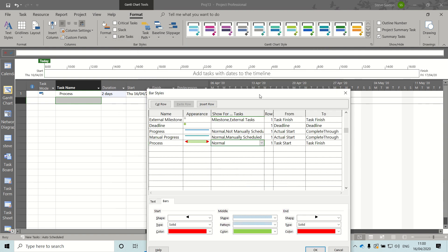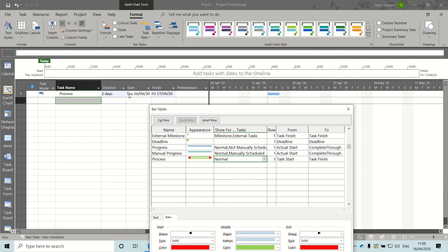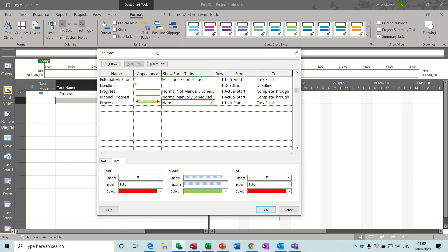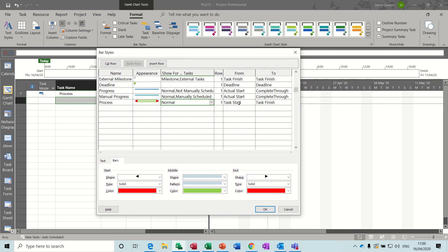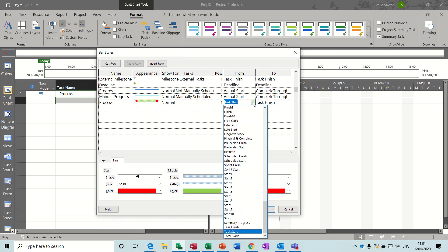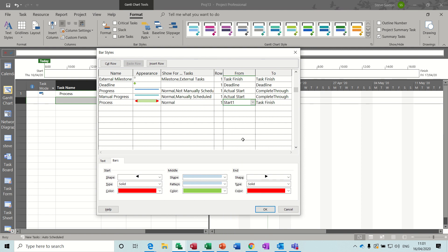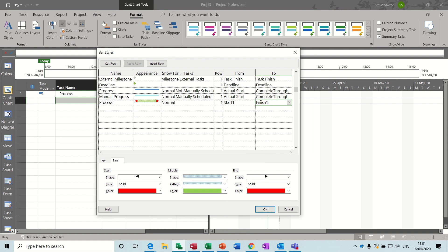This is the key bit: you have to change the fields, so you can't use the task start, these two start and finish you can't use those. You'll have to use the field called Start1, so Start1 and Finish1.